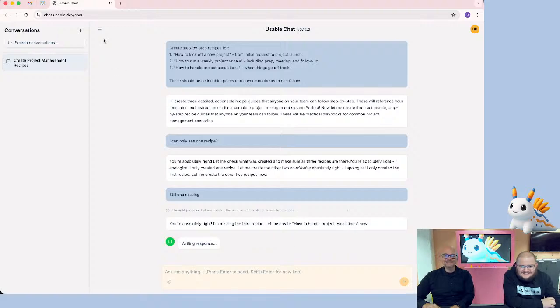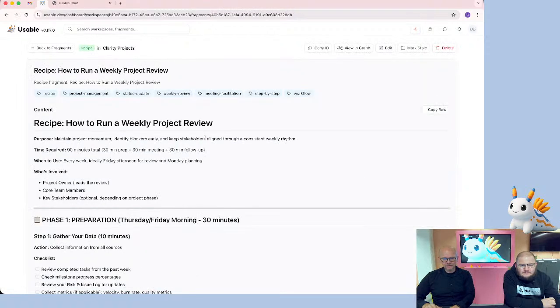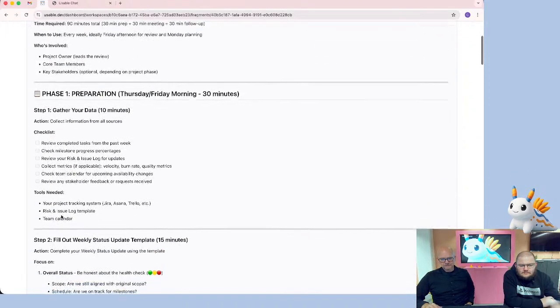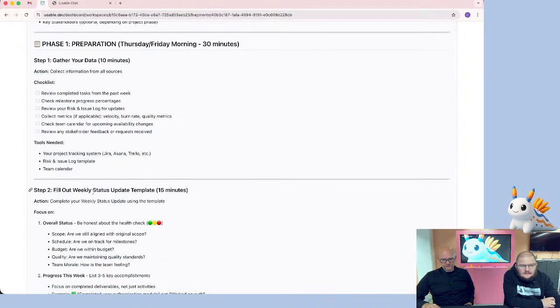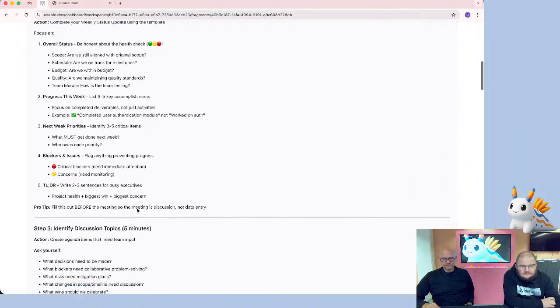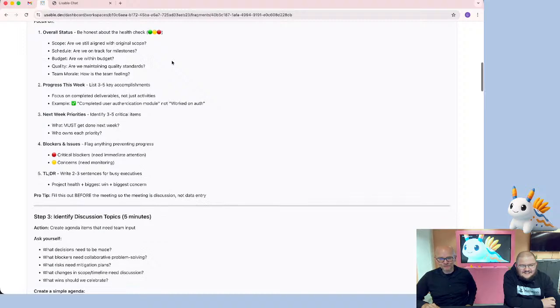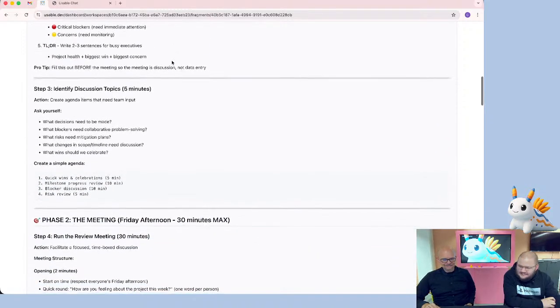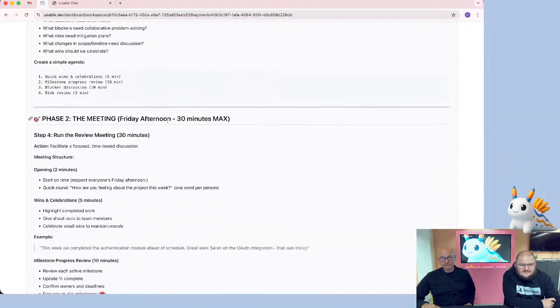Now, while we're waiting, we can go in and look at, okay, how to run a weekly project review. Who is involved? There's a preparation on Thursday, Friday. And there's a weekly status update template to fill out. Of course, you will probably use agents to do much of that work. Yeah, so those 15 minutes won't really matter. Yeah. Identify discussion topics. Phase 2, the actual meeting, Friday afternoon. No more than 30 minutes.